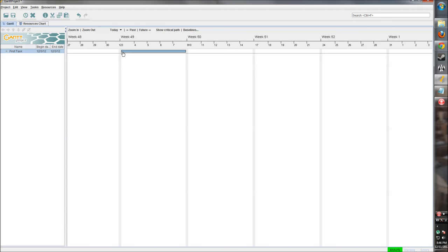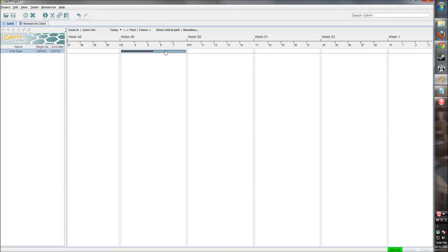We can also show how much progress has been made in this task. So if we start all the way over here at the left and hold down left click and move across, we can increase the percentage by which, say this task is half done, so we can increase it to 50% that way.